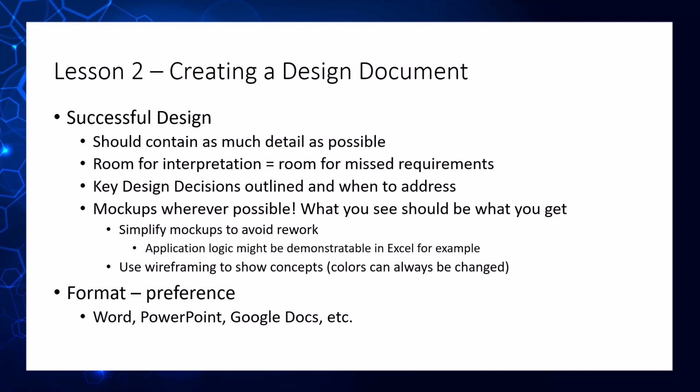So you can get very advanced with your UI design, for example, and have all the colors and shapes and everything all outlined and perfect in there, or you can simplify it a little bit to reduce some of the amount of time that it takes. So maybe you're not showing all the colors, you're tweaking colors during development stage or testing, but during design you show it without the color, or just show a very simplified version of the interface.